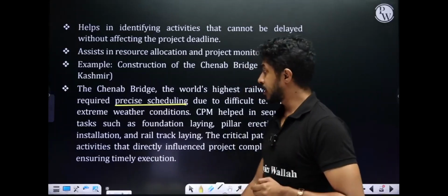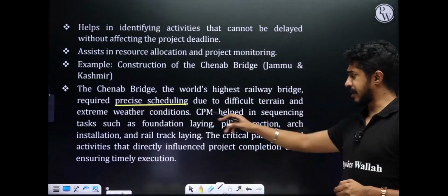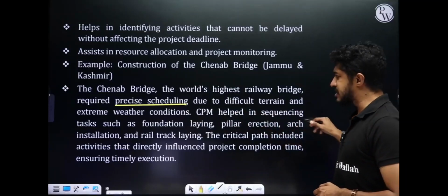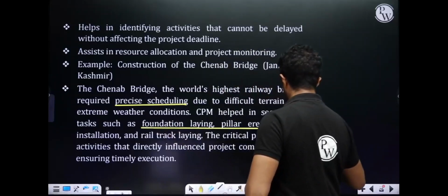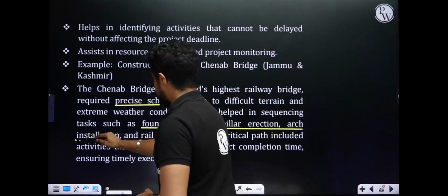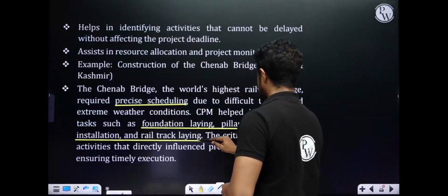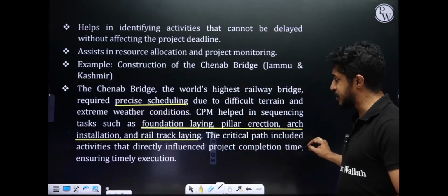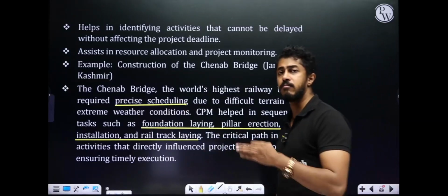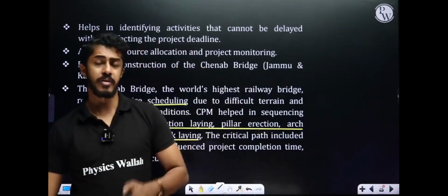We need it. Due to difficult terrain and extreme weather conditions, CPM helped in sequencing tasks such as foundation laying, pillar erection, arch installation, and rail track laying. The critical path included activities that directly influenced project completion time, ensuring timely execution. That was the beauty of it.